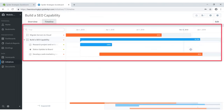On the timeline tab with a more complex initiative, you can expand the view of the build SEO capability initiative to see the unique individual tasks and milestones that are part of it, gaining a good understanding of how each has its own defined timeline. Regarding Gantt chart colors: red indicates you're either behind schedule or over budget; blue means you're both on schedule and under budget.